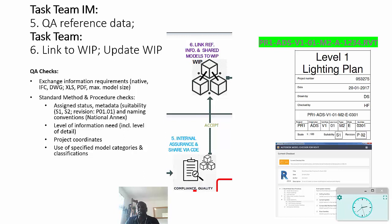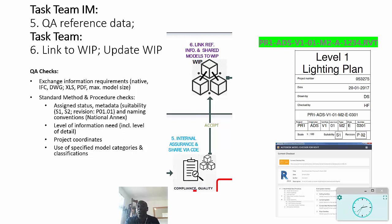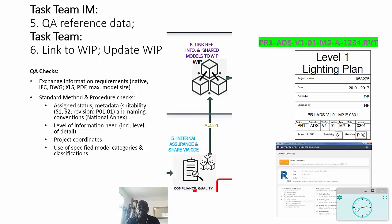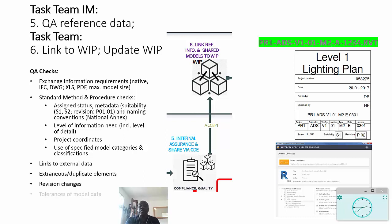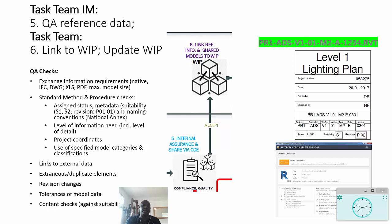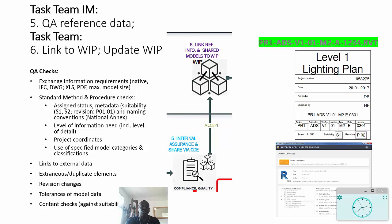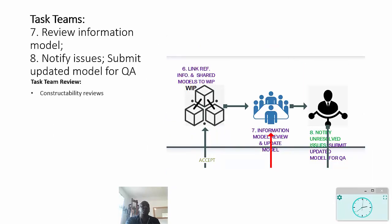And of course it's important to use specified model categories and classifications, which are specified - example being UniClass, but there are others. These are some of the other things that you might want to check before you then link, or the task team links that information into their work in progress, and on that basis uses it to update their work in progress.